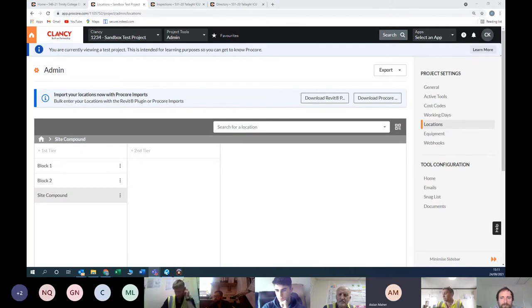And that QR code is actually on the door when it comes to site, and the carpenter fits it. Then he's using that same QR code to finish off the checklist, which is something not a lot of joinery manufacturers would do for us, but they're doing it for us on the project we're on. So it's something you could ask going forward on a project that you might be on. It just saves all the hassle.